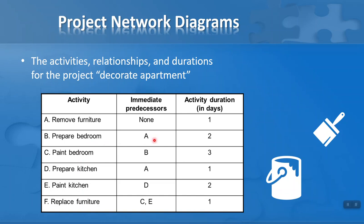Activity B, prepare bedroom, can only start when the furniture is removed, so it's dependent on activity A. Activity C, paint bedroom, can only start when preparation is complete, so it depends on activity B — I only list the immediate predecessor. Prepare kitchen also depends on removing furniture, so its immediate predecessor is A. Paint kitchen depends on prepare kitchen, so its immediate predecessor is D. Finally, replace furniture can only happen when both the bedroom and kitchen are painted — activities C and E respectively. The durations in days are: remove furniture one day, prepare bedroom two days, and so on.